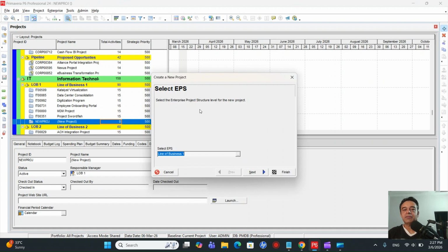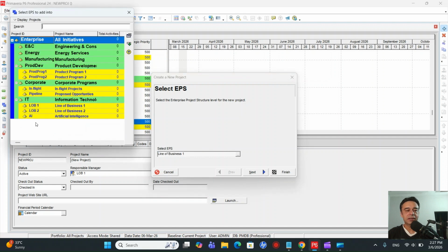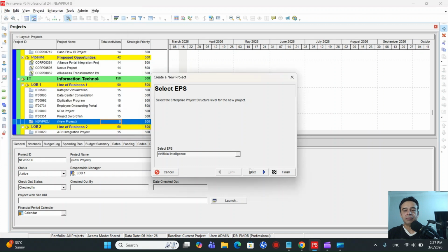The first thing that we will have to do is select the EPS, which stands for the Enterprise Project Structure. In the previous video, we have already covered what the EPS is and how to create a new EPS. In order to select the EPS, we will click here and select any EPS. For example, we can select Artificial Intelligence. This basically is the category of the project. Then we will click Next and we will specify the project ID.